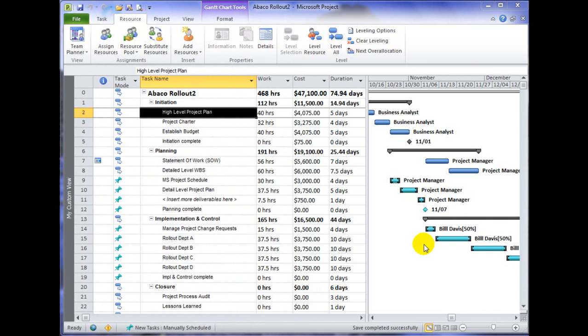In Microsoft Project, you can assign work resources to detailed tasks. Work resources are the default resource type when creating resources, and when you assign a work resource to a task, it is the amount of work estimated multiplied times the hourly rate of that work resource that determines the cost.